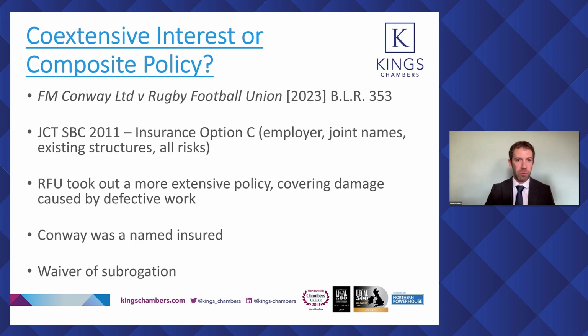Conway ran the co-insurance defence on the basis we've seen in earlier cases, and Conway's argument was that since it was co-insured under the policy and since there was an express waiver of subrogation in the policy, there could be no liability on the part of Conway to the RFU, and there could be no subrogated claim against Conway by the insurer. Okay, so following CRS, Guard Marine, and some of the other cases we've seen, on the face of it, that sounds like a good defence.